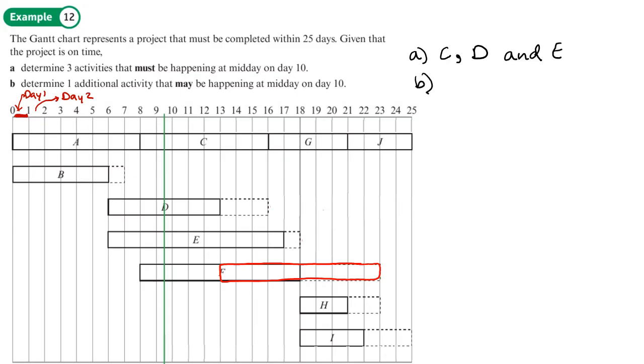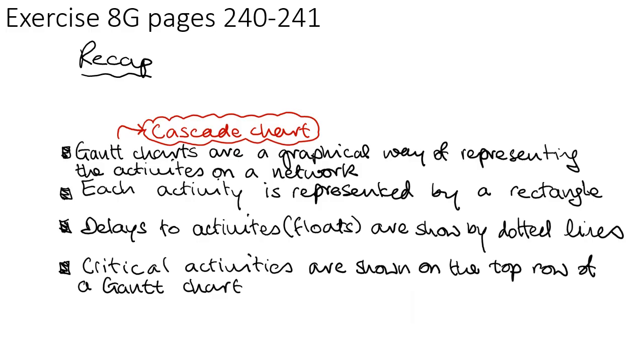And in part B, what we need to do is determine one additional activity that may be happening at midday on day 10. And that is this activity F. It may happen. It doesn't have to happen. So that is just F. Activity F may be happening at midday on day 10. So you should now be able to complete exercise 8G on pages 240 to 241.